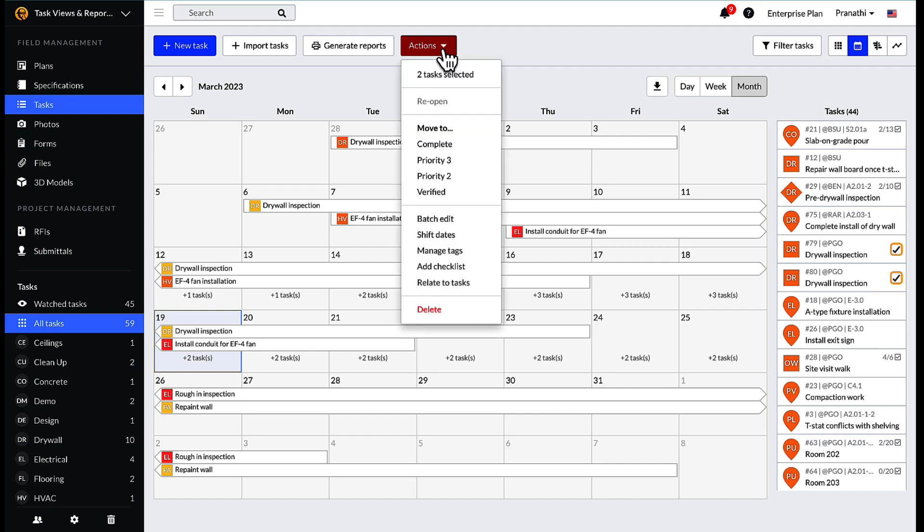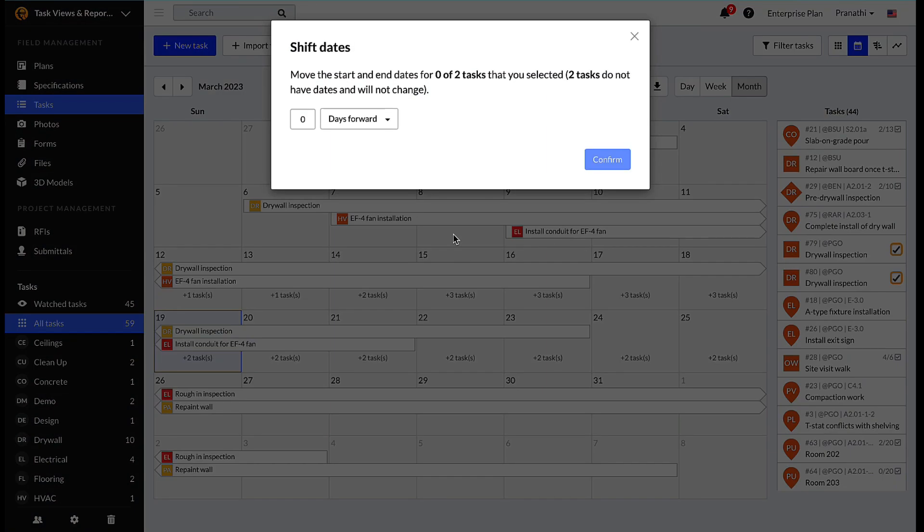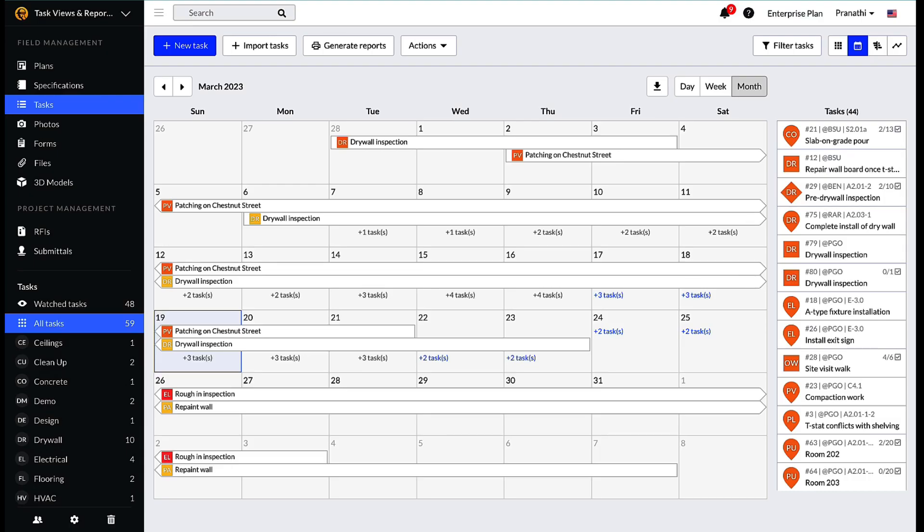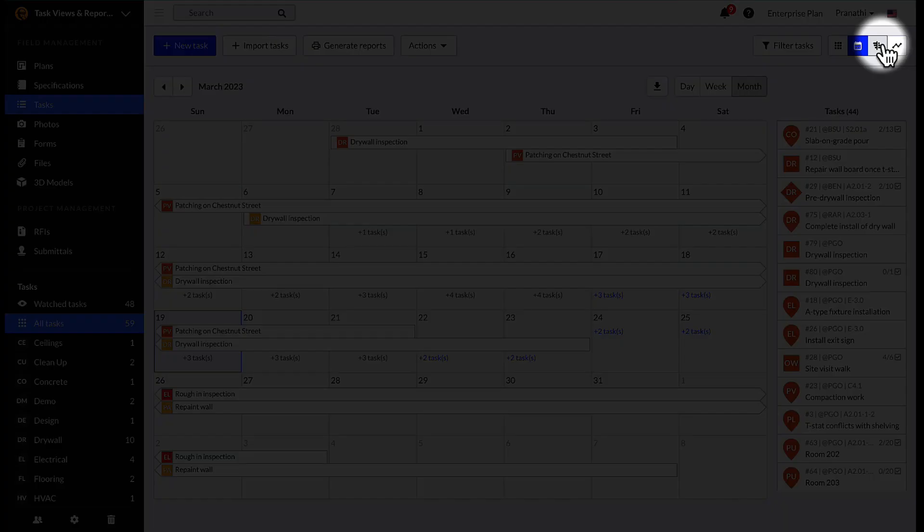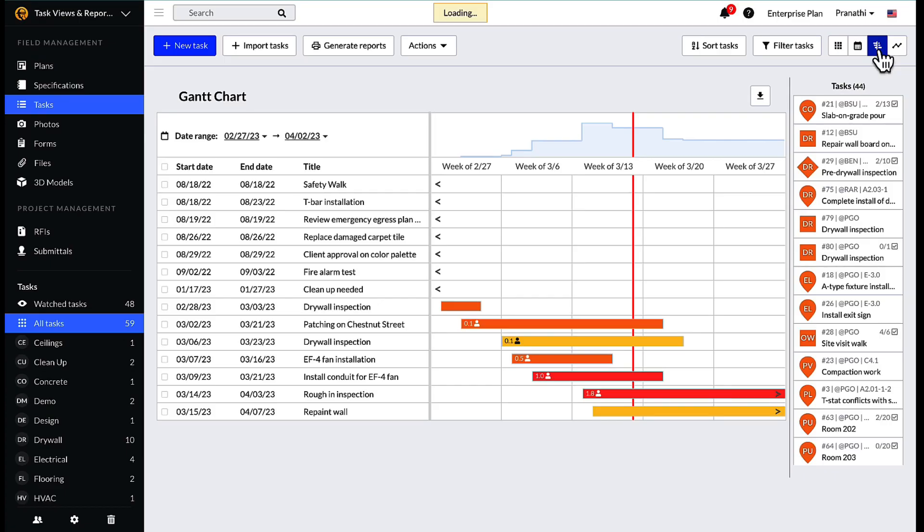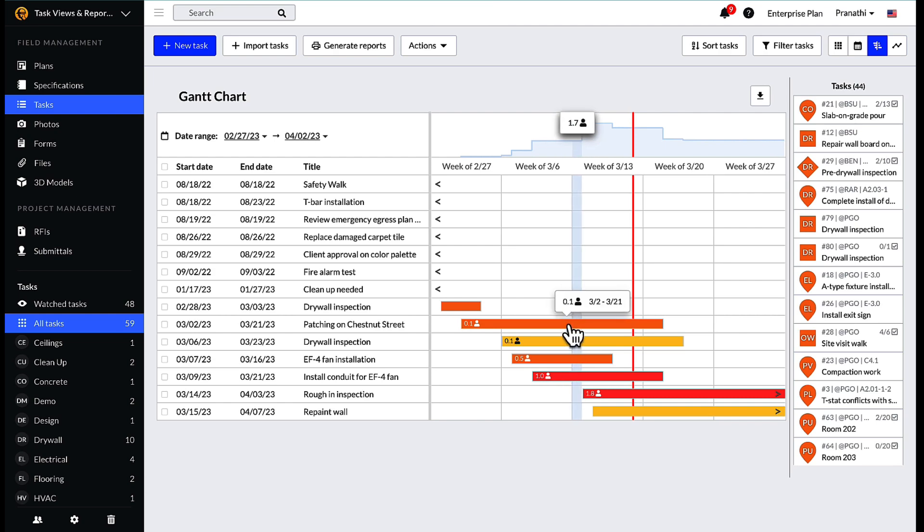Next, there is the Gantt chart view. The Gantt view is accessed by selecting the bar icon next to the calendar icon in the upper right hand corner of the screen. Tasks can be seen on this view by the start and end dates associated with the task.